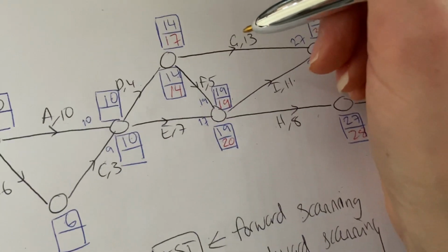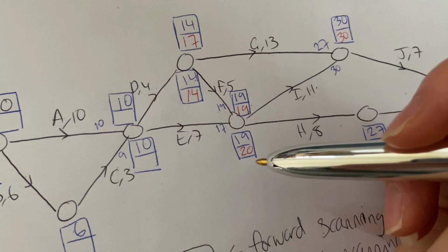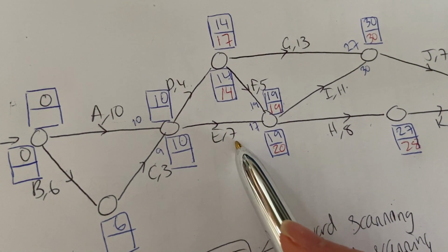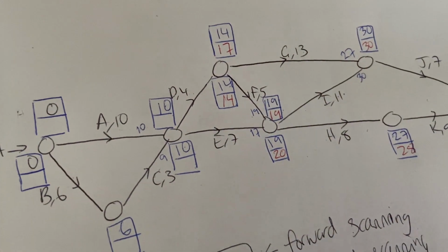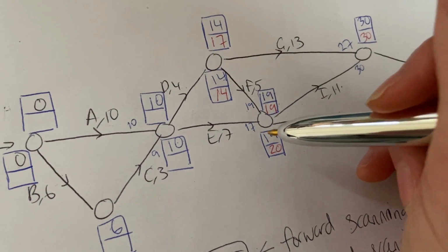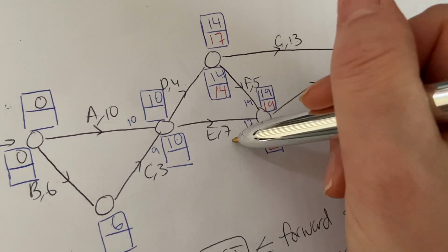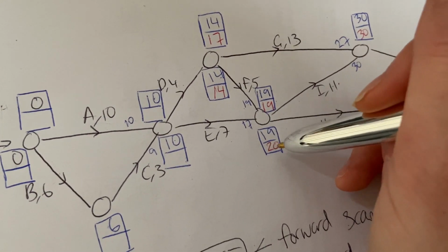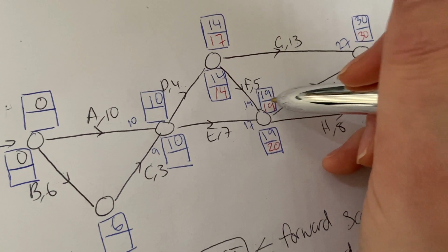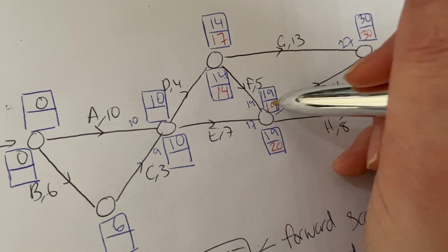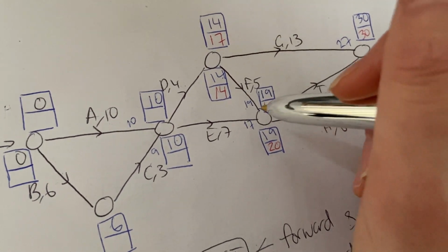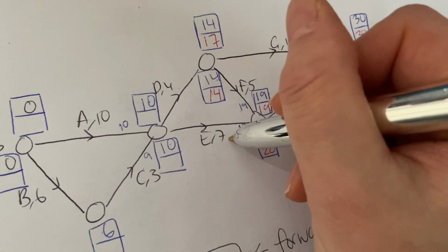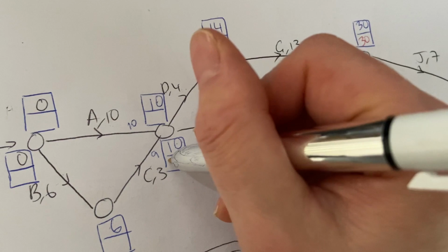All right, so now we'll go over here. Let's do E, 20 take away 7. Oh, whoops. See, almost did it without thinking. 19 take away 7, because we're not looking at the box that has the bigger number. We're looking at the one that has the smallest. Always work from that. It's really easy to forget that. It's the main tricky thing about having these extra boxes. 19 take away 7 is 12.